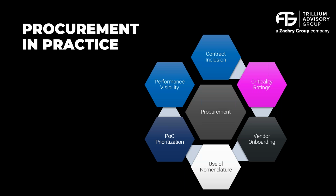Contractors have spent a lot of time learning about AWP. We're trying to force those learnings again upstream into the E&P. We assign criticality ratings to various pieces of equipment and packages, and also to specific subcontract types. We made deliberate efforts to train vendors and suppliers in AWP. We've had sessions with critical vendors and spelled out the requirements to support AWP during their fabrication and ultimate delivery. And also during those sessions, as you touched on briefly, we introduced the concept of a vendor work package.